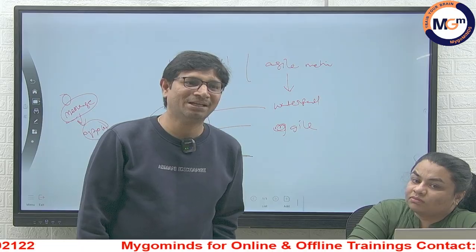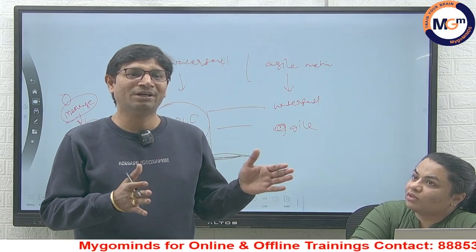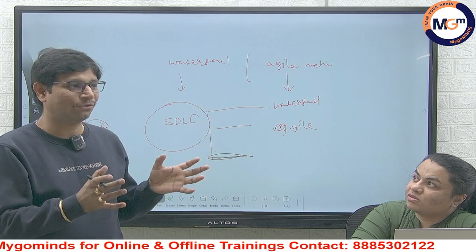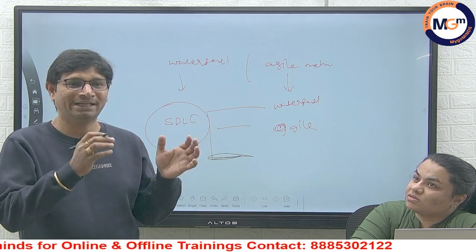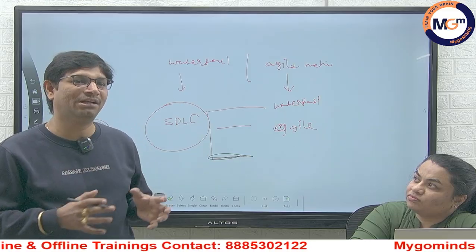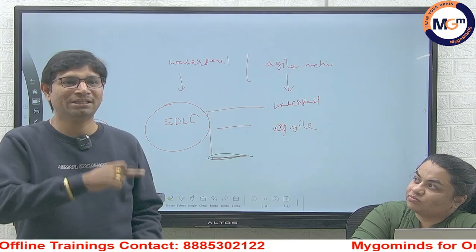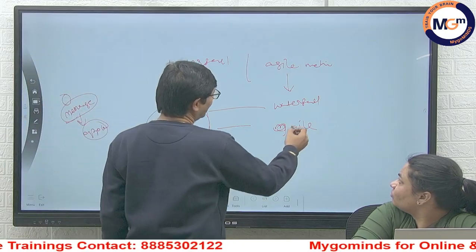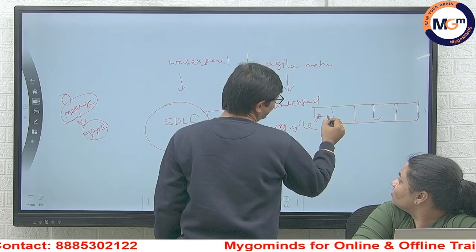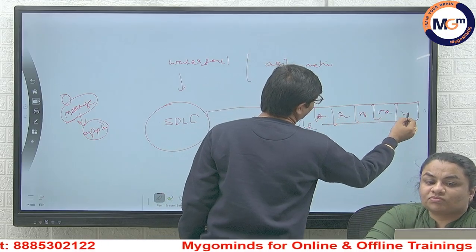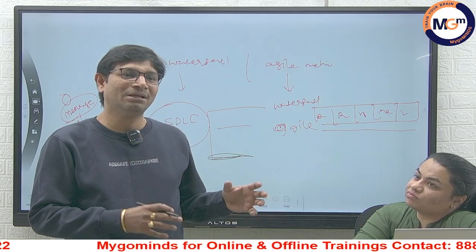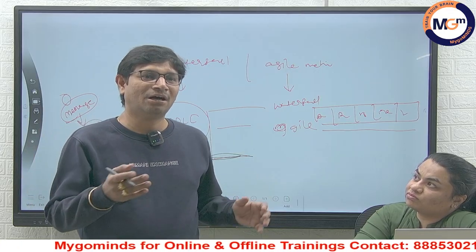The waterfall methodology works sequentially. From a development perspective, the developer develops the entire code, the whole application. In SDLC the phases are requirement analysis, plan or design, build, test, and deploy. In waterfall they follow a sequential manner: first analyze, plan, build, test, deploy, everything sequentially. For example, they do the deployments manually.